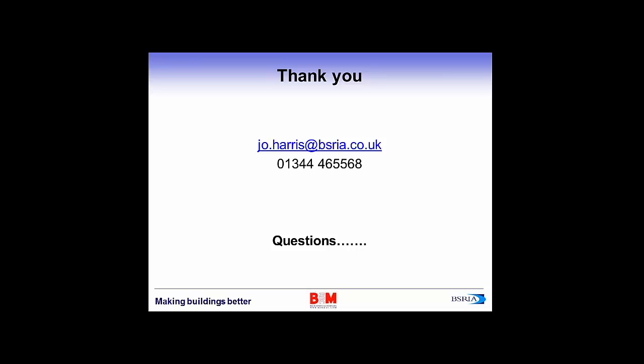Fantastic, thank you. What are the possible issues you face when working with various BIM teams that are located in different countries? For example, if the teams are in Dubai, Singapore or London? One of the big things will be transferring data. If you think about BIM models, BIM software is very hungry and creates very large data files. So that will be an issue, but also making sure that you all agree the same protocol. We talked about that BIM protocol document. That's the one that you'll need to set out and agree at the start of a project when you're working across countries. Sure, thank you.